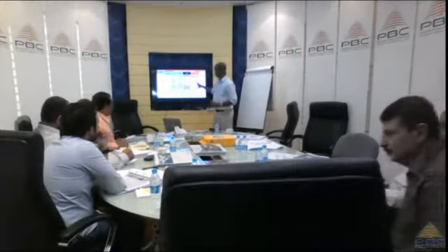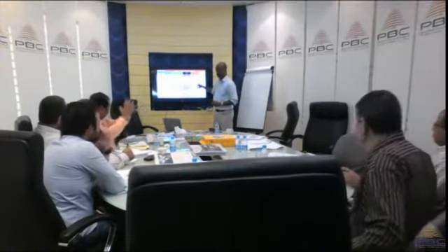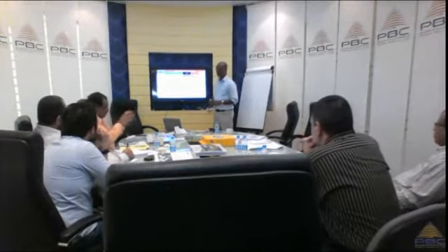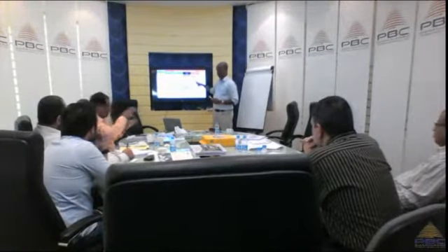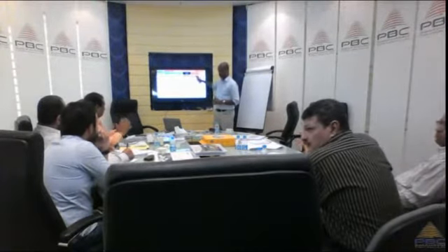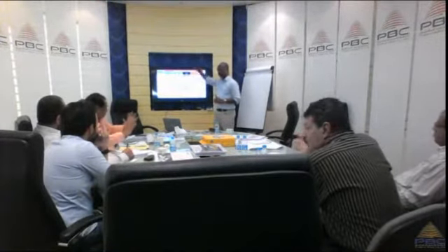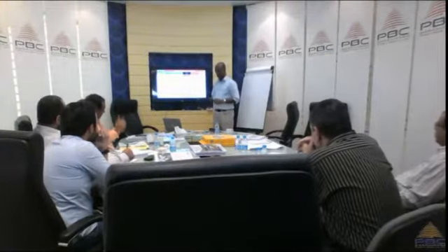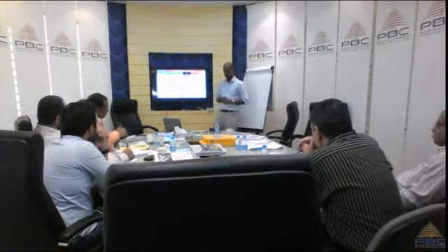Update the schedule, activity durations, compressing. Okay. Updating the cost also. Updating the resources. Right. Maybe your resource calculation is too low and you have to input more resources. Exactly. So as a result of this monitoring and controlling, you will update the schedule. It could impact other things also. Don't forget to update the risk also.